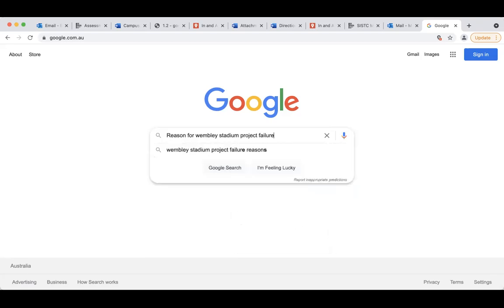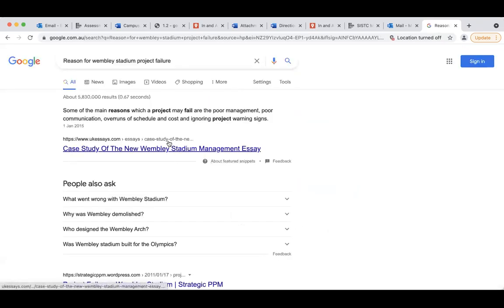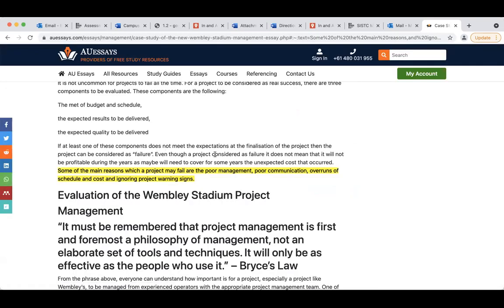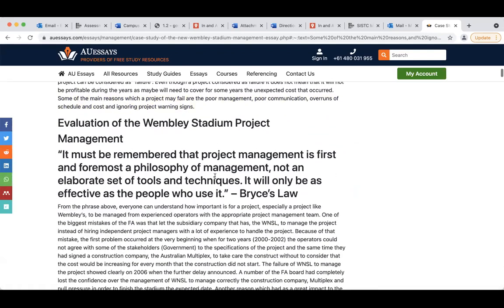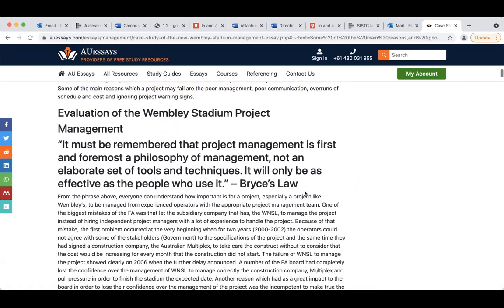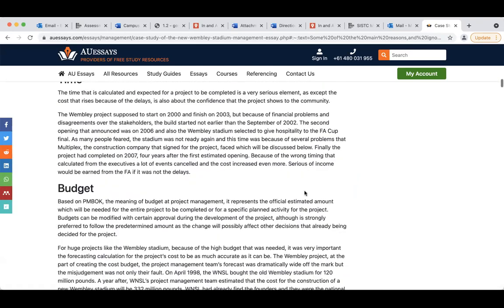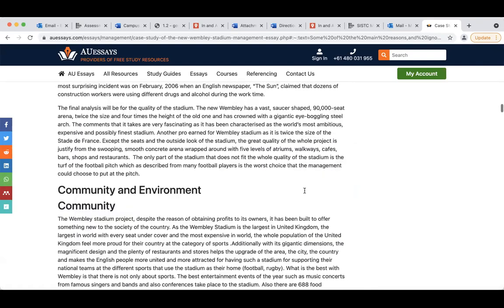So they were replacing subcontractors midway through the project as well. Okay, so they were basically not using the same people. They were changing contractors, changing the team. So by the time they build their knowledge, they have to go and try again to learn. So I'm just trying to have a look.